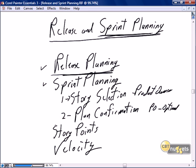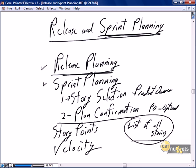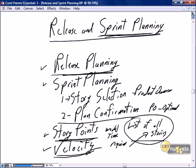At the end of the sprint planning meeting we have an absolute list of all the stories that will be completed in the sprint, and we have confidence that all of those stories can be completed because we've selected and agreed to them based on an understanding of the story points associated with each story. A story point is the work and time required to complete a story, and velocity is the team's capacity — how many story points can be completed within the sprint.